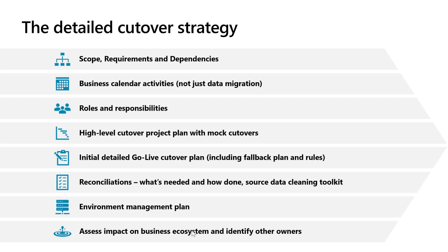You'd be defining what reconciliations you're going to need to do, and how you're going to make sure that the data that's come over from the current legacy systems over to Dynamics is accurate and fit for use in the new system. You'll have some definition of an environment management plan. What environments will you need to move the data into? Where are you going to do your validations? Where are you going to do your performance testing? And so on.